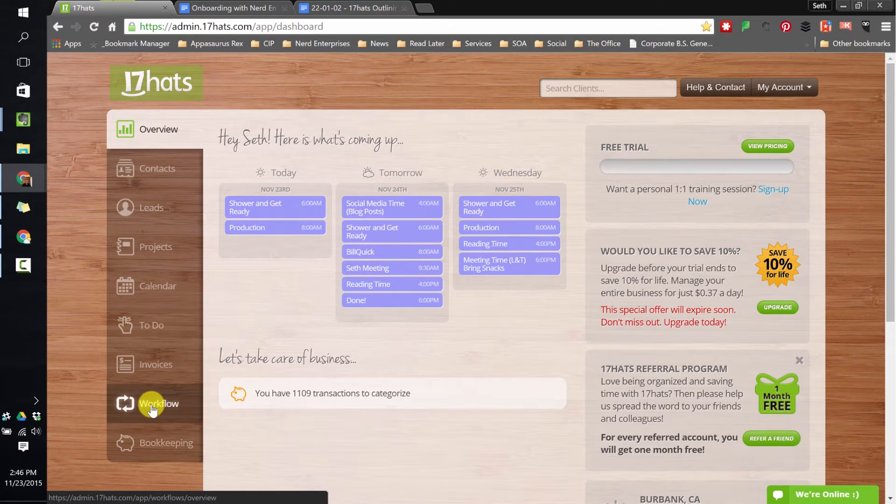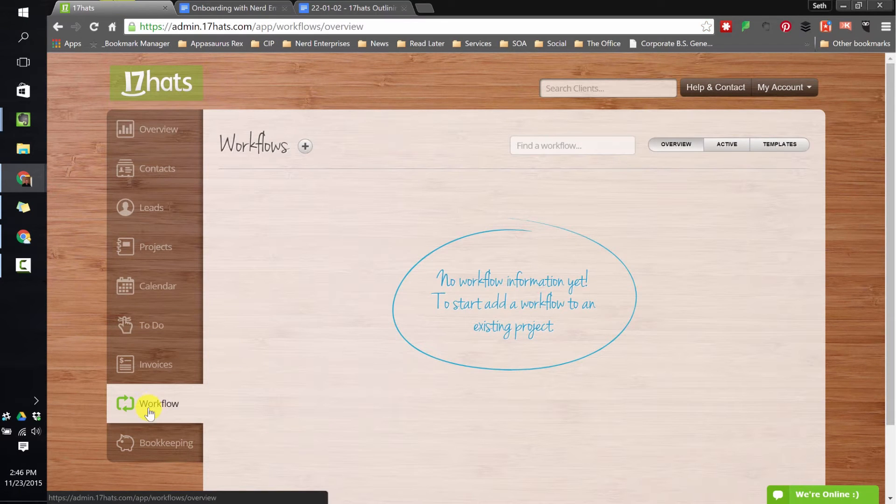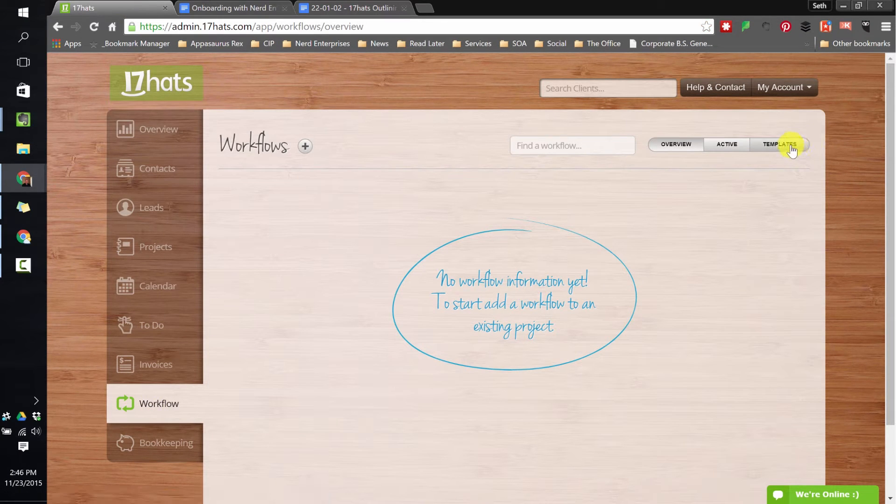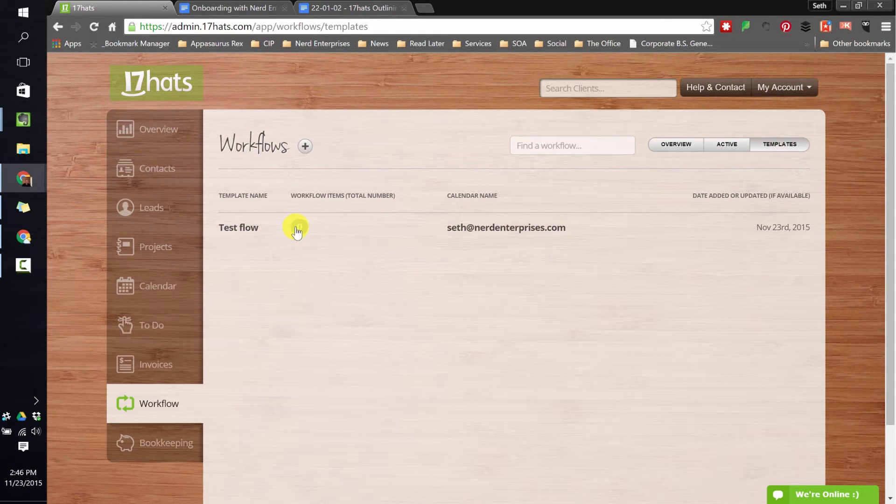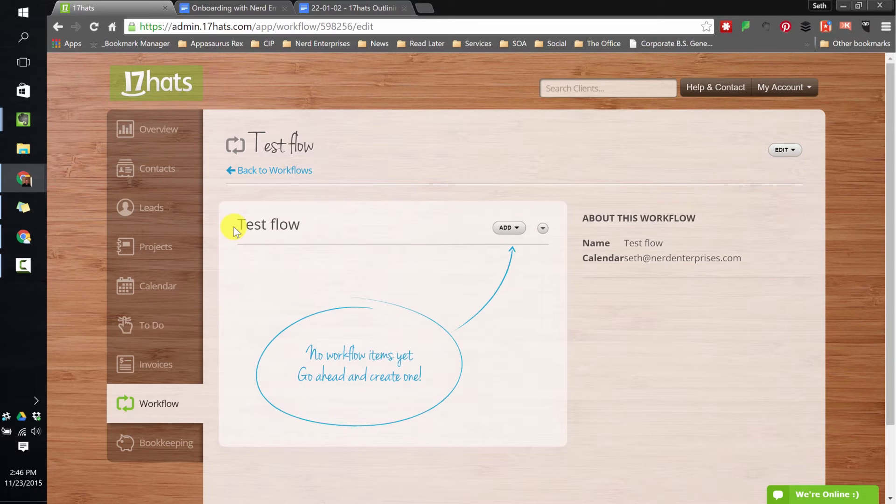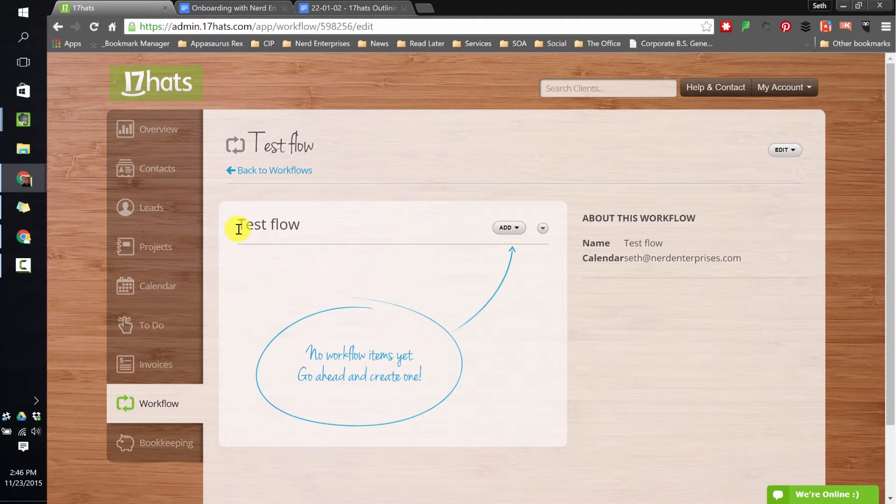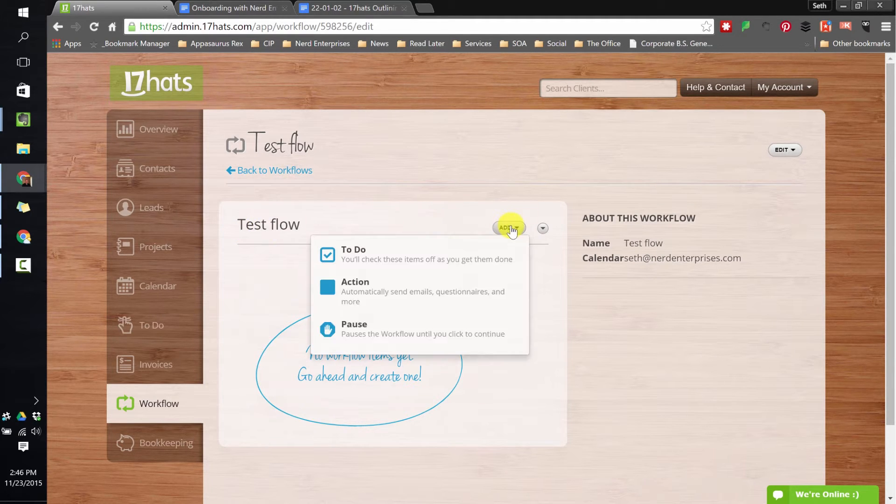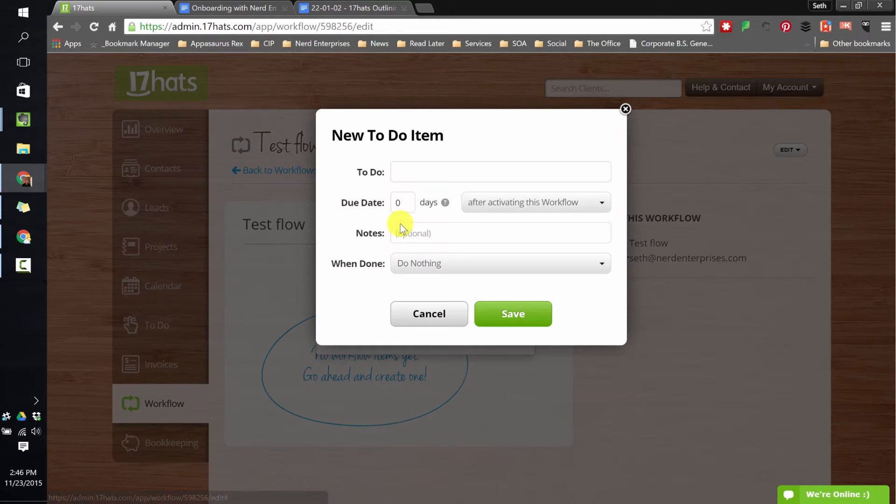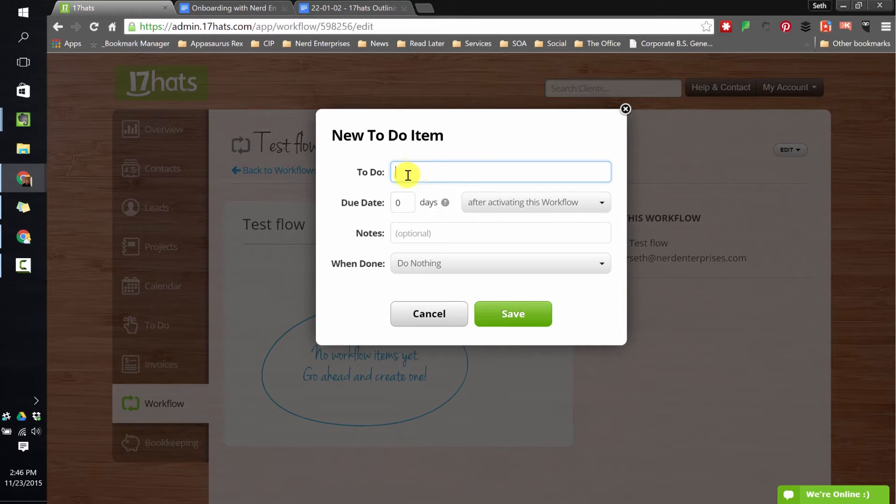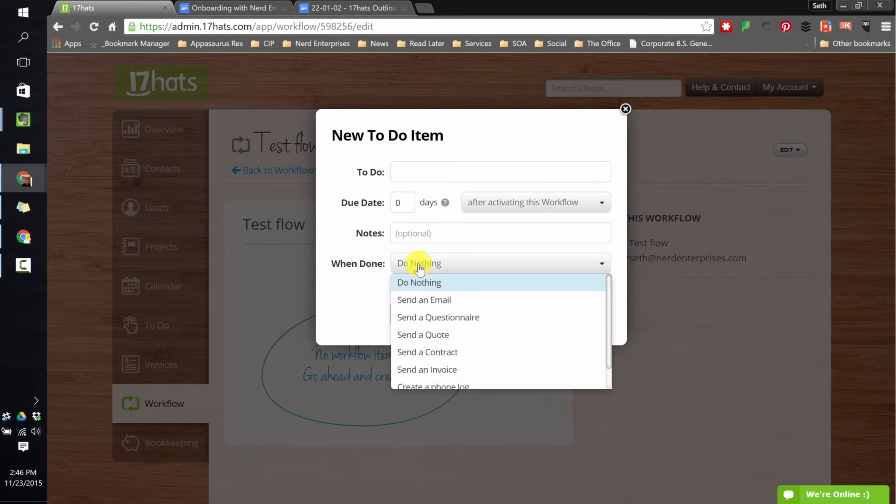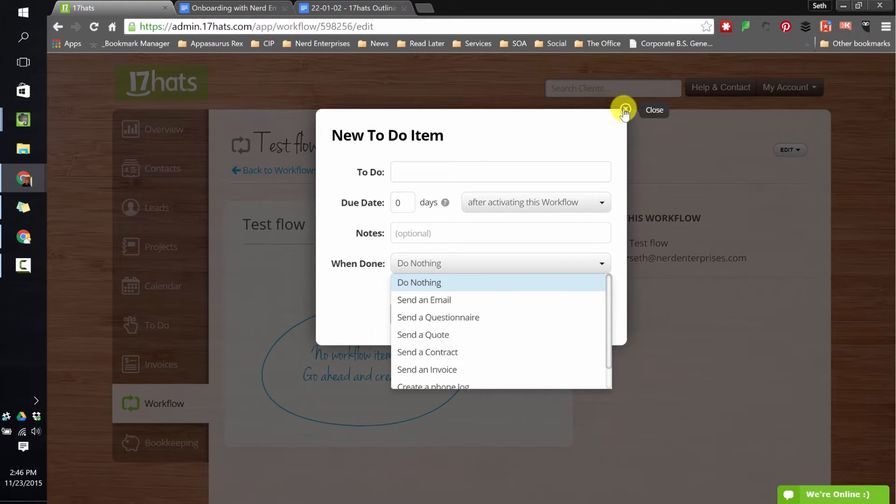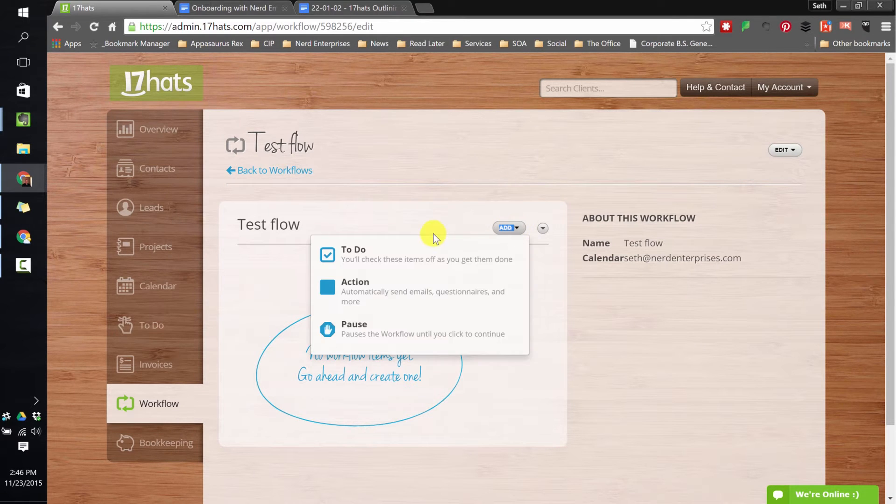And so again, creating this outline of your process before going into 17 hats to do it will go a long way to making the whole process of setting up your workflow much more smooth. And I'll show you what I mean. Let's go into 17 hats and let's say I want to go in and create a workflow. Now if I go over to templates, I created like a test sort of dummy workflow. And I suggest you do the same because what this enabled me to do while I was creating the outline that you're going to see in a minute is it enabled me to say, all right, if I am going to add a to-do item, what are my options here? A to-do item is pretty simple. It's just that, right? I can create a description of what needs to be done and I can decide when to activate it and I can decide what to do when it's completed.